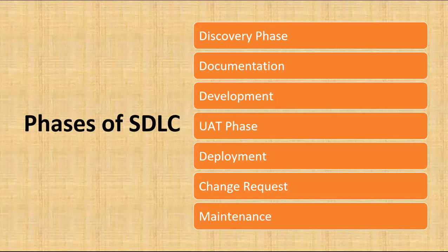You do the testing from first step to last step, compare with your PDD, and track your results, like expected results and actual results. You track the results, note down the results, and if you feel any missing piece is identified, if you feel this step or that step is missed, inform the technical team, the development team. Technical team means development team. And make the necessary changes, and you go for the next stage. This is something we do as a testing stage.